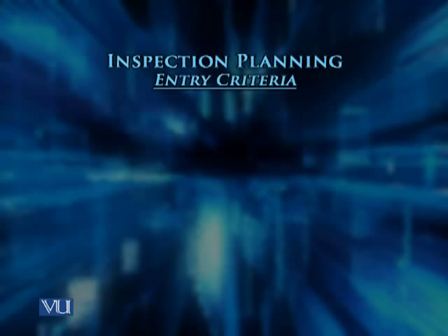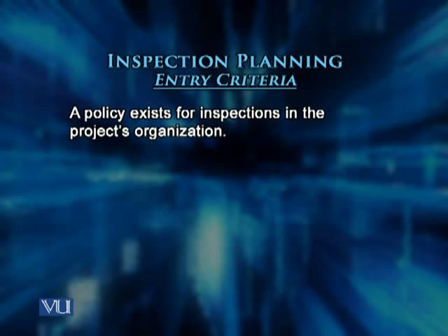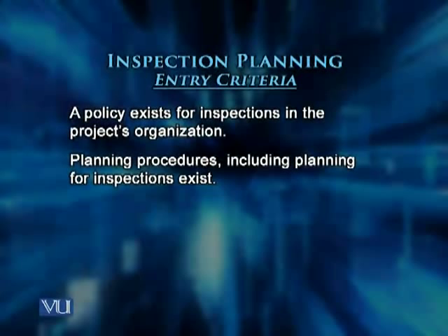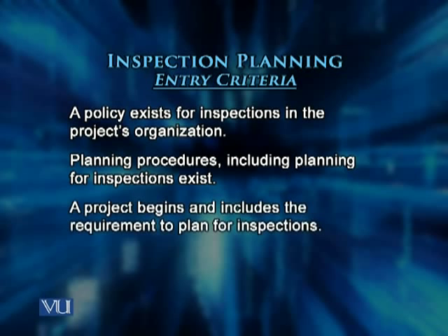What are the entry criteria for inspection planning? Number one, policy exists for inspections in the project's organization. That is, how can you have inspections if there is no policy? If the company does not recognize that inspections are necessary, how can you have inspections? So the first and foremost thing is that you need to have a policy. Remember when we applied the ETVX to the inspection process, the first thing in the entry criteria was policy. Second, planning procedures, including planning for inspections, exist. Again, very reasonable that planning procedures must exist in the organization. Third, a project begins and includes the requirement to plan for inspections.